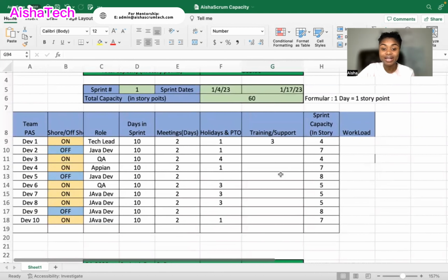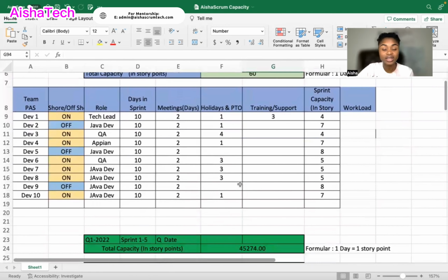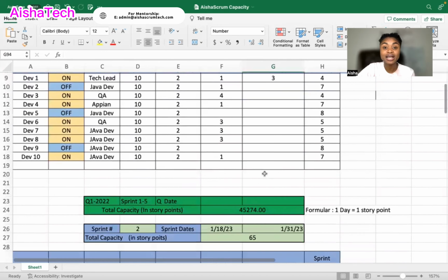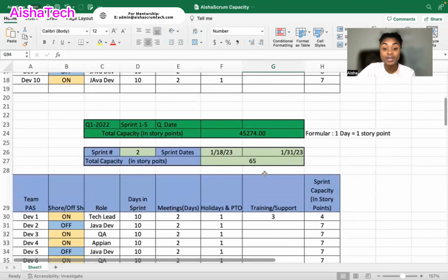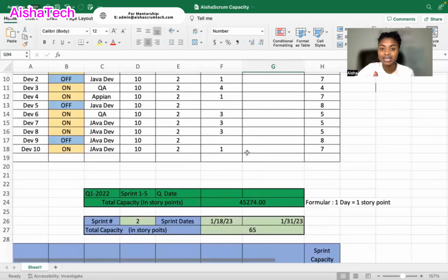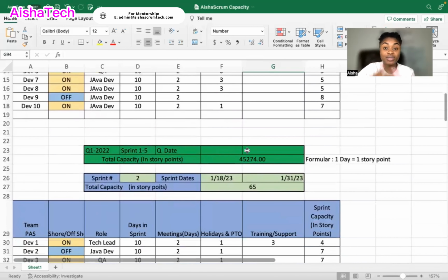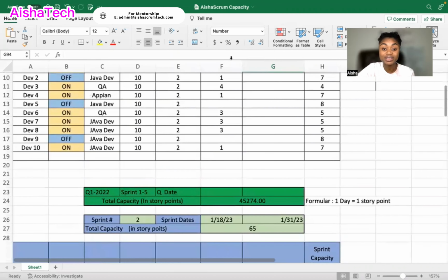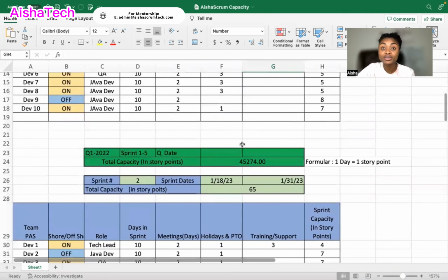Just know that capacity planning is one thing, and I know it's heavily practiced in SAFe environments. This is one thing they'll always want from a Scrum Master, to ensure there's a capacity planner in place. For companies I've worked for that were not SAFe, we only used the capacity planner to get a baseline for our team, just to kickstart it. Then as our team completed sprints, we went to our true velocity data and started using our average velocity. Although I still use capacity planning to have it in place, I've also sometimes been in a position where I have to use both, in the middle between a capacity planner and a velocity.